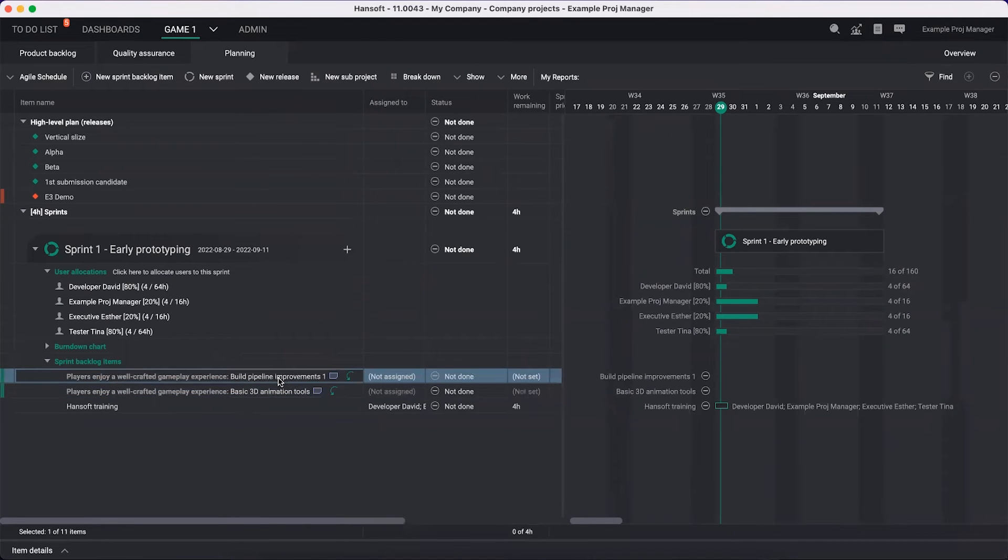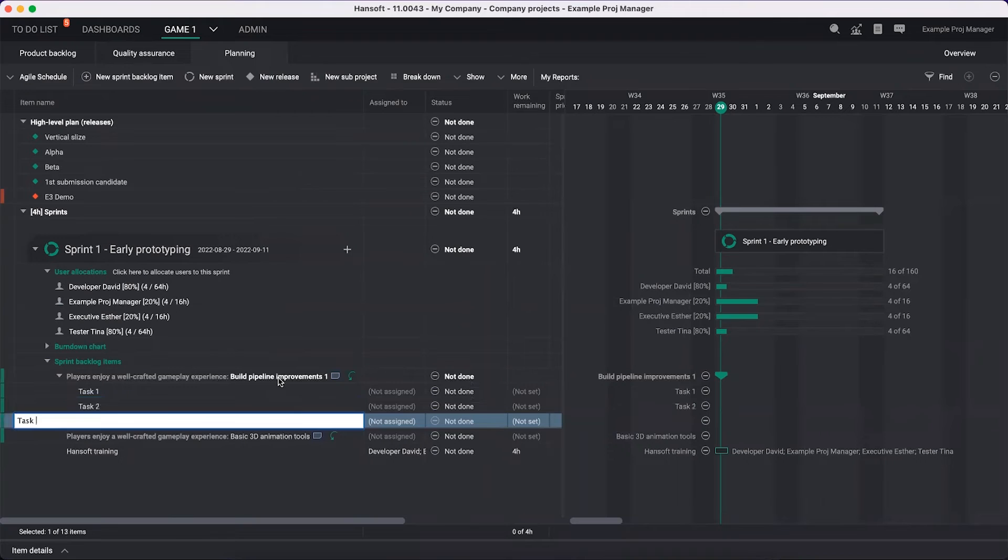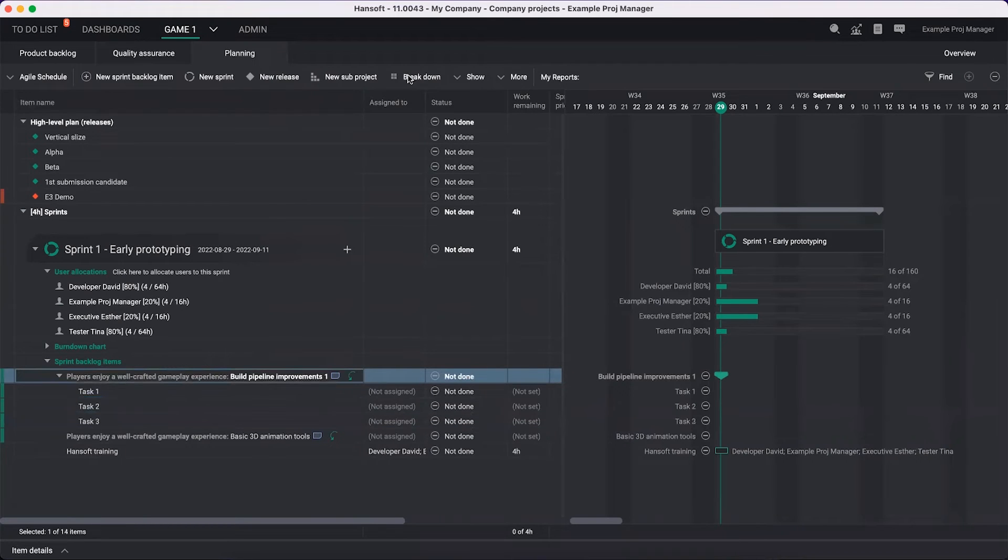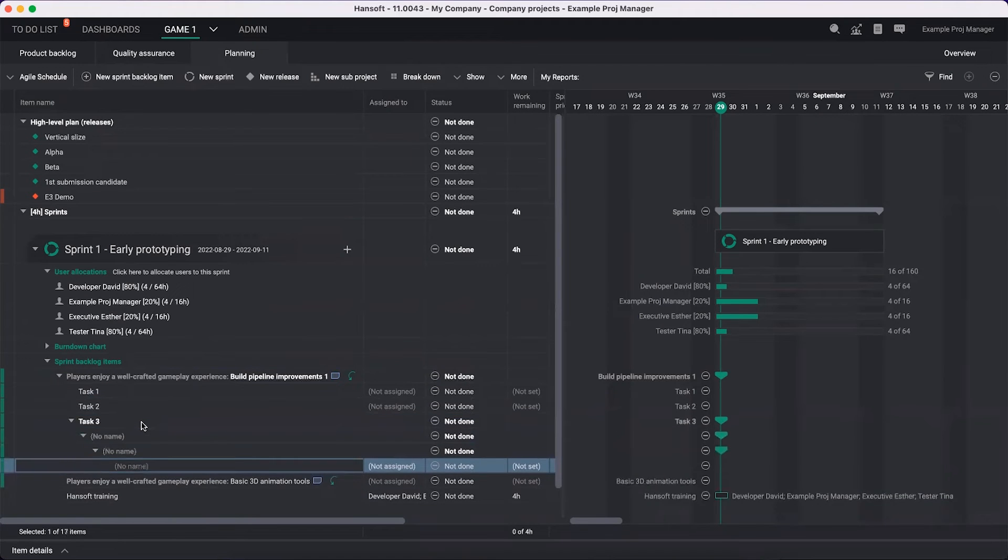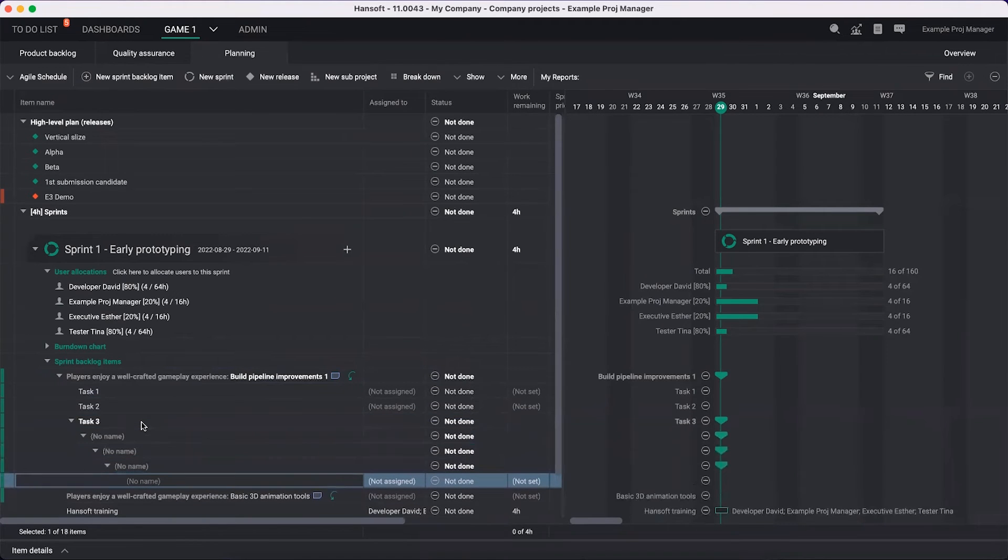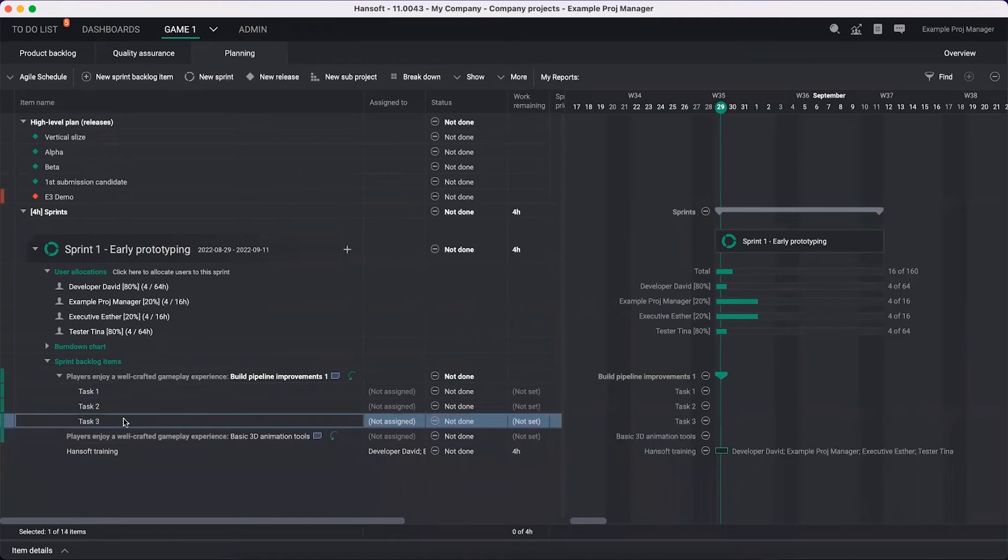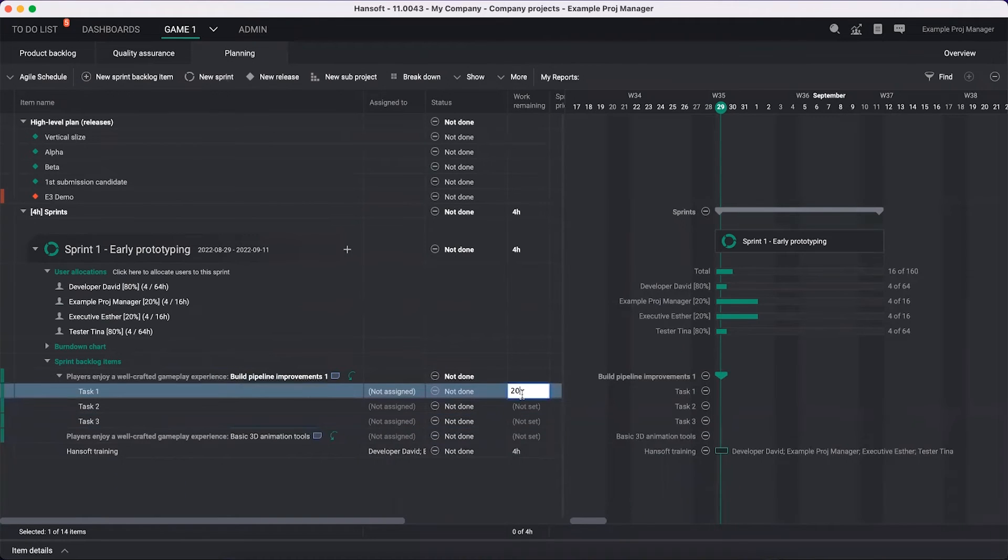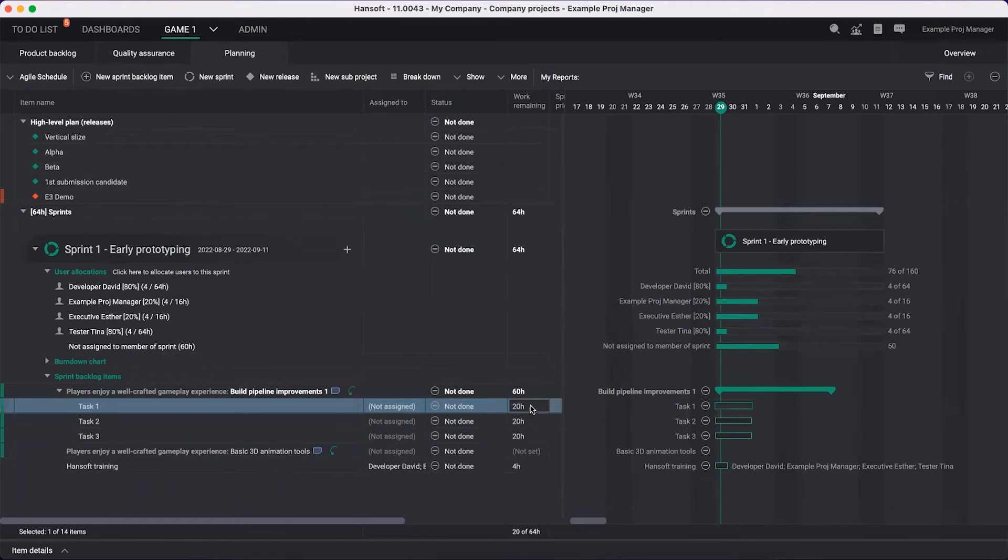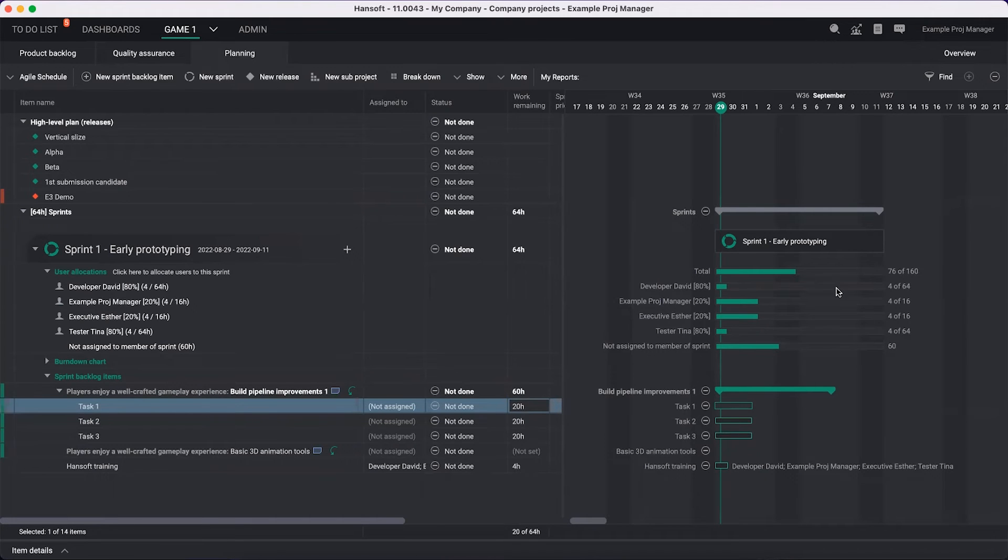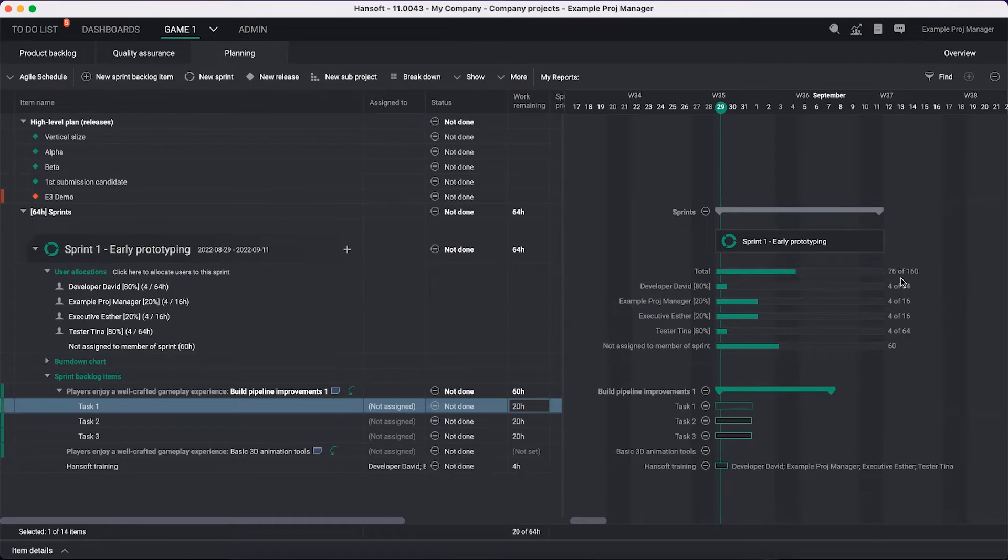Now we can start breaking these down into tasks. I can do this - task one, task two, task three. I'm using keyboard shortcuts here. It's the same thing as using breakdown - you can hit control shift N for breakdown and control N to create a new task. I can break things down to as many levels as I would like. Then we might give this some estimates. Let's say they're all going to take roughly 20 hours each. You'll see now how there's a bar here saying not assigned to member of sprint showing up. Even if I haven't assigned this to anyone, we will start seeing these bars filling up, so I'm not over-allocating on the total team level.